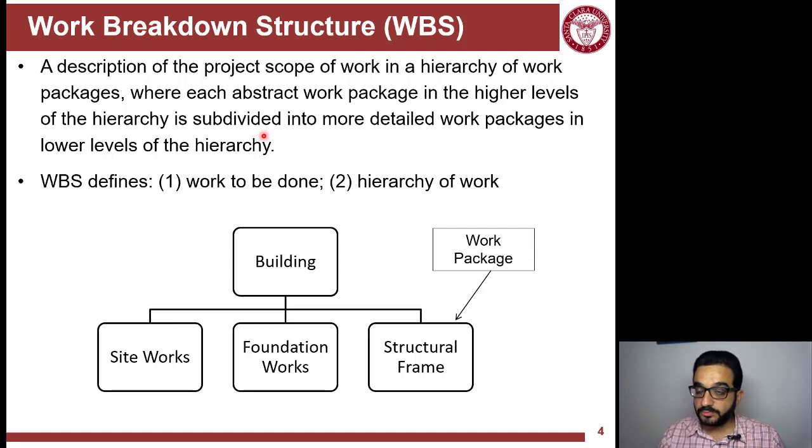Whatever tool or representation you use, it should have levels of hierarchy and breakdown steps. So the WBS here defines what will be done in the project and the hierarchy or the relation between the different packages or components of the building. You see here the building can be broken down into site works, foundation, and structural. Every one of these blocks is a work package within the building project.